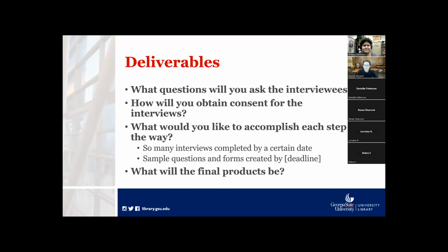You also need to make sure all your forms are ready, all your sample questions are ready. Especially if you're going to be using IRB, you have a lot of paperwork that needs to be done. IRB has a very specific process, and most interviews are usually exempt, but you still have to go through it, and there's a time turnaround. So you need to go to whichever IRB is your local one, if you have to use IRB, and find out what their cycle is, because you need to put that into your cycle for planning for all of this.